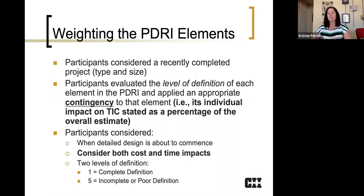If I had complete definition for this element, what contingency would I apply or assign to that? And if I had unclear or poor definition at that point just before detailed design and construction, how much contingency would I apply? They would list both of those and that would provide anchor points for the research team to determine how important was element A1, for instance, in relation to element A2, A3, A4, etc.